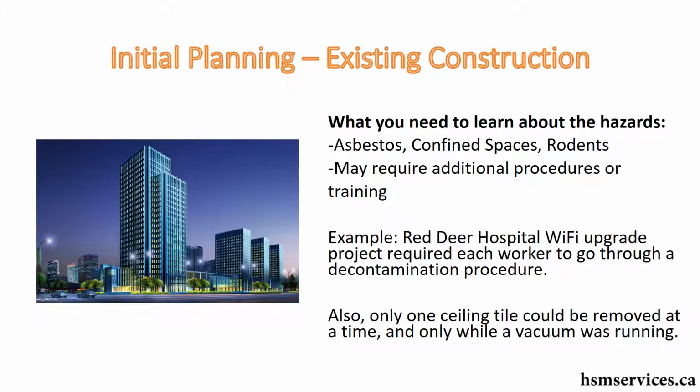Well, messed up projects, not messed up in terms of the way it was done, but in Red Deer, for example, they had a hospital that had a Wi-Fi upgrade, and they had a decontamination procedure, and you could only take one ceiling tile out at a time to go look in the ceiling, and you had to vacuum that ceiling tile before you took it out, and then you had to take it out and keep vacuuming. They didn't want the dust to contaminate the air in the hospital for health reasons for their patients.